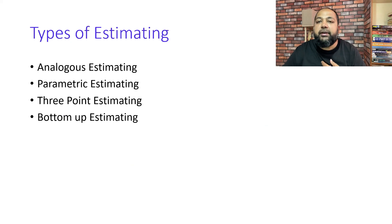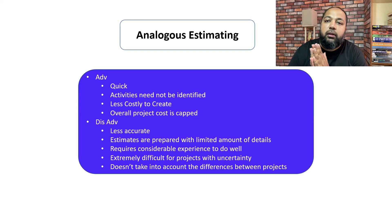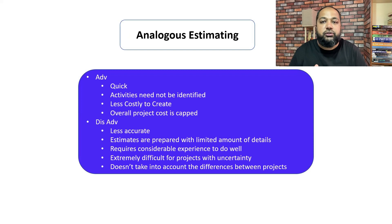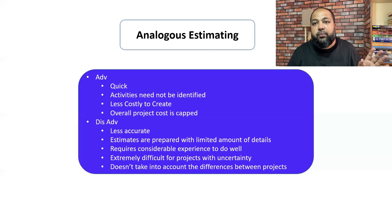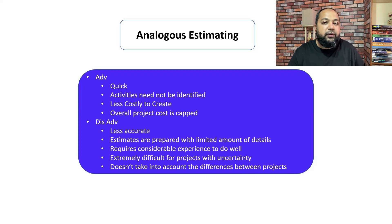There are four types of estimating techniques: analogous, parametric, three-point, and bottom-up estimating. For analogous estimating, advantages include: it's quick, activities need not be fully defined, it's less costly to create, and gives an overall project cap. Disadvantages: it's less accurate, provides limited information, could be wrong, requires considerable experience, is difficult for project uncertainty, can't easily be used on agile projects, and doesn't account for differences between projects.